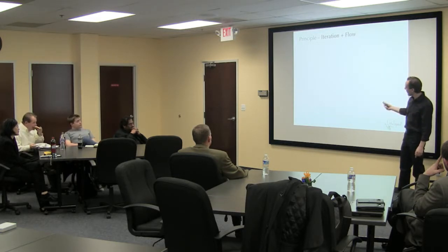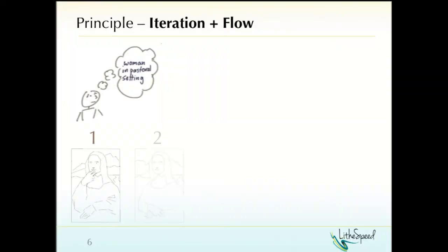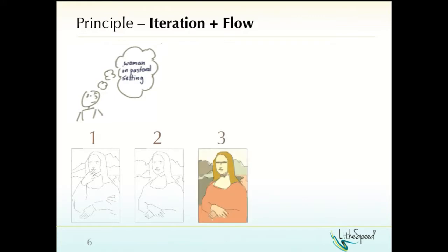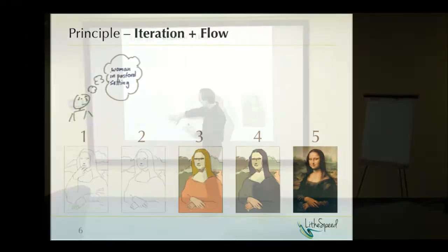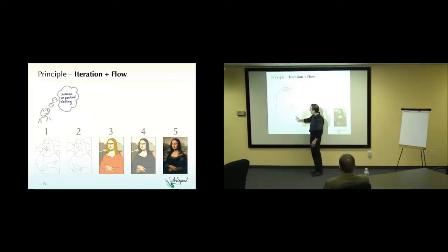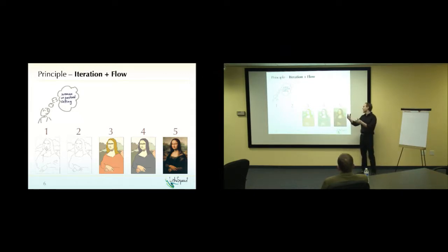So we do, of course, do incremental development in Agile. We do. But we also, and perhaps even more so, do iterative development. So in this case, we've got a little bit of a different picture emerging here. Here, we're starting out with a rough idea. And we can see there's some problems with it. So we're gradually making it better here. This is about the face. So let's soften the background. Let's put her hand in her lap. Let's take that blonde hair and that bright salmon outfit and let's mute it out a little bit because we'd like the focus to be here. And once we're happy with it, then we can flesh it out and spend our energies polishing off the last bits of it. This is iteration.